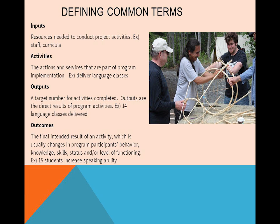Outcomes are the final intended result of the activity — usually changes in program participants' behavior, knowledge, skills, status, or level of functioning. The outcome is the whole reason you did this project to begin with, and can also be your project goal. For our language project, we want to see a change in the speaking ability of our students. Your outcome usually includes a target number based on your inputs, activities, and outputs. For example, if you can only deliver language classes to one grade level, you'd set a reasonable target for how many students increase their speaking ability.